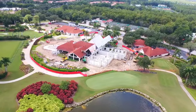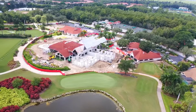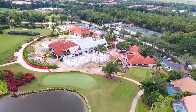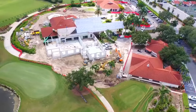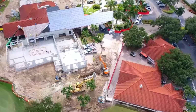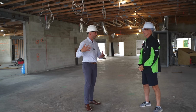So I think we're all ready for trusses at both ends, but the slab, as soon as this pour is complete, which I think is this week or next, the rest of those walls will go up at the perimeter, and that's what supports the trusses. So they still have about 2 weeks of work to do masonry and tie beams. We should see some block work on the pool cafe in this end of the building the week of Labor Day, towards the end of that week?